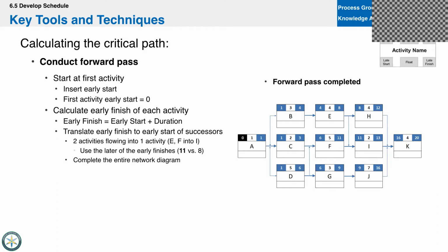So here's day 0. Okay. So what we're gonna do is early start plus duration, and we'll get the early finish. Now that we're done with this column, there's only one activity, so we're done. Now we're gonna do the forward pass. And we're gonna go to this column, we'll get to the first activity, and we're gonna look back and say, how many predecessor activities do we have? Well, B only has 1, and it's A. So therefore, 1 is the largest number, and we put it there. Same thing with C. A is the only predecessor. D is the only predecessor.